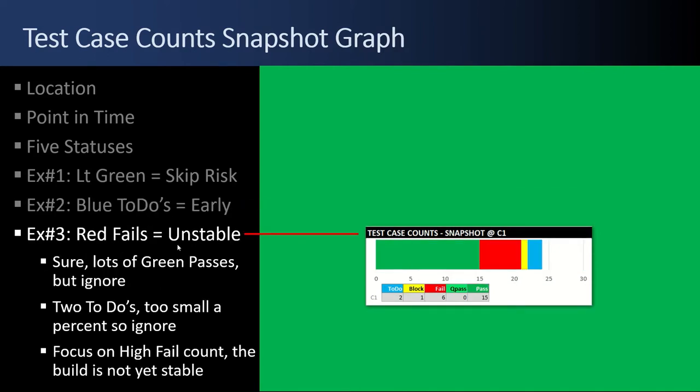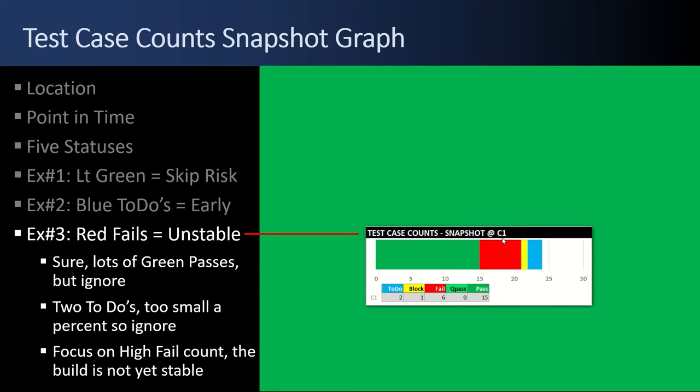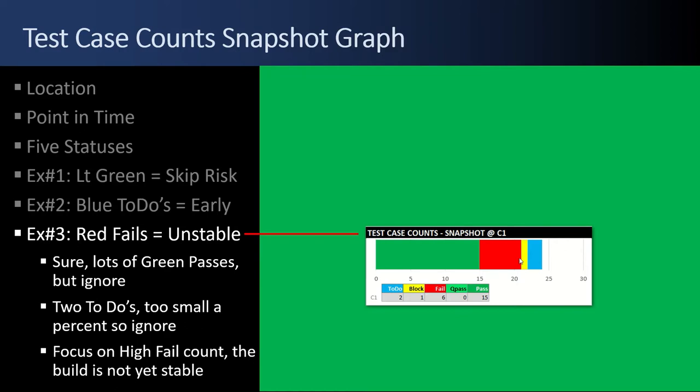Example number three, a lot of red fails. That equals instability. Sure, there's lots of green passes, but I'm focusing on the red. That tells me there's high fail count and the build's not stable. Yeah, it's test cycle one. You just got the build. So I would anticipate test cycle two and three, and these reds would eventually start going down.